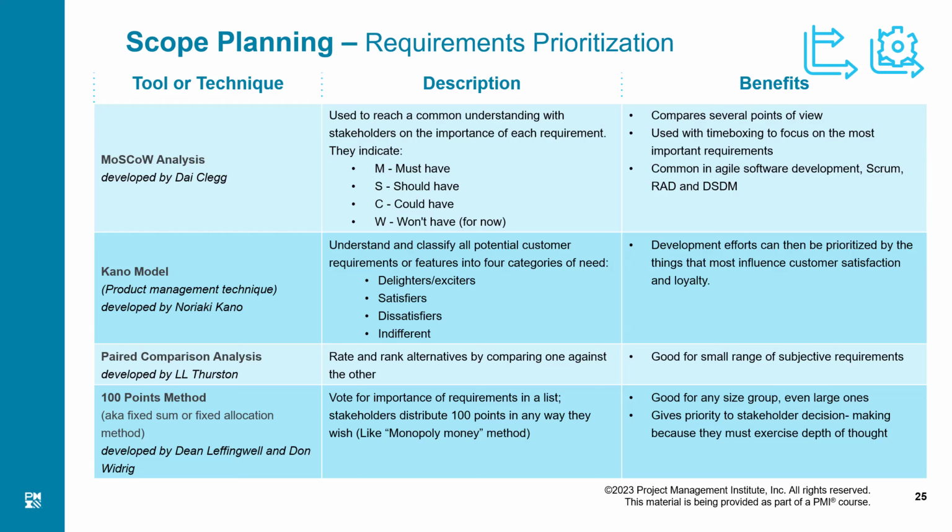Now, won't have is the least important category, which may not be done, and if not done, will not harm the objectives of the project. And could have are the optional category. If none of them could be done, that is still all right. But you see, in a predictive project, we will discuss that with the stakeholders and the customers.